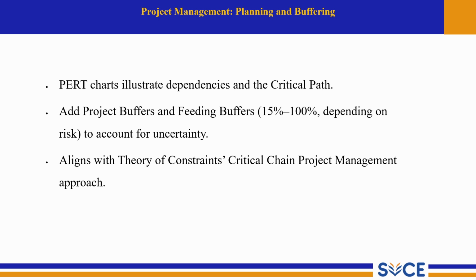In other words, extra time is added either at the end of the project or before risky tasks. So unexpected delays don't derail the entire schedule. Aligns with the theory of constraints, critical chain project management approach.